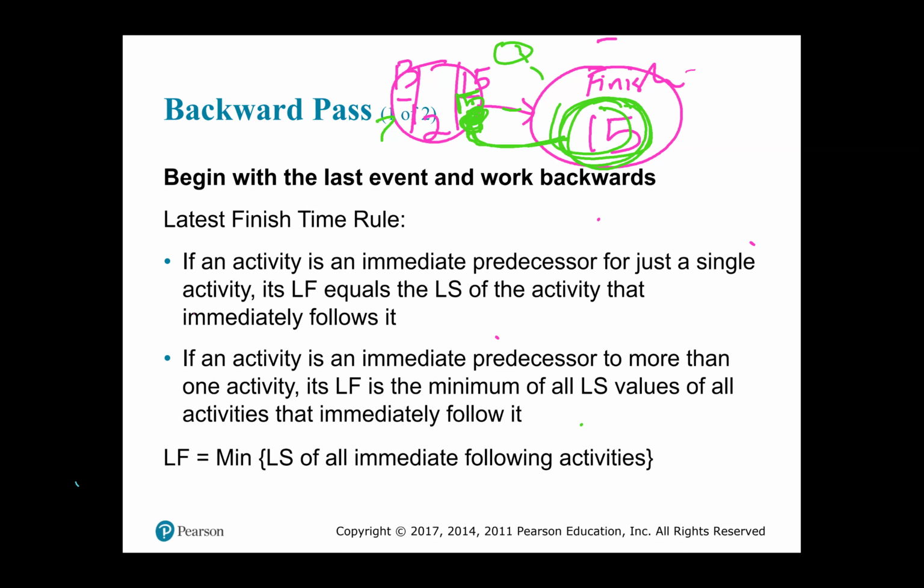Now remember, if you had more than one node going into the finish node, that information in the finish node will also be taken to those other nodes that came into the finish node, and go into those other late finish slots. All right?